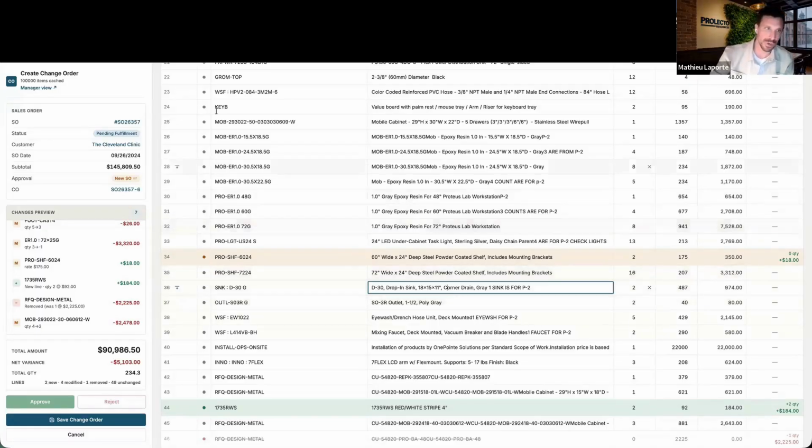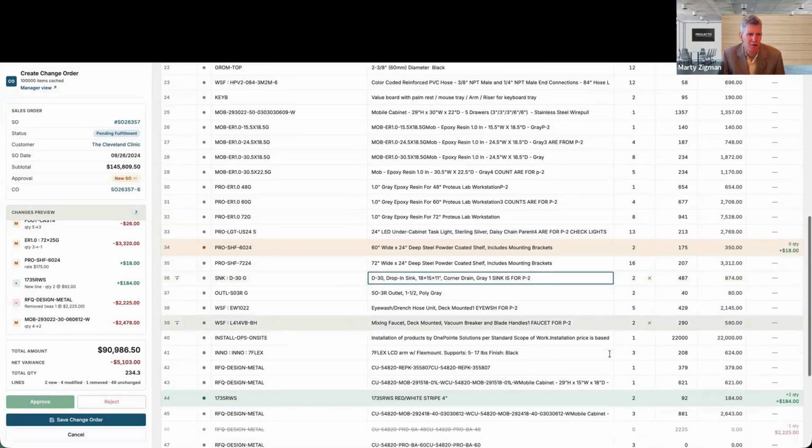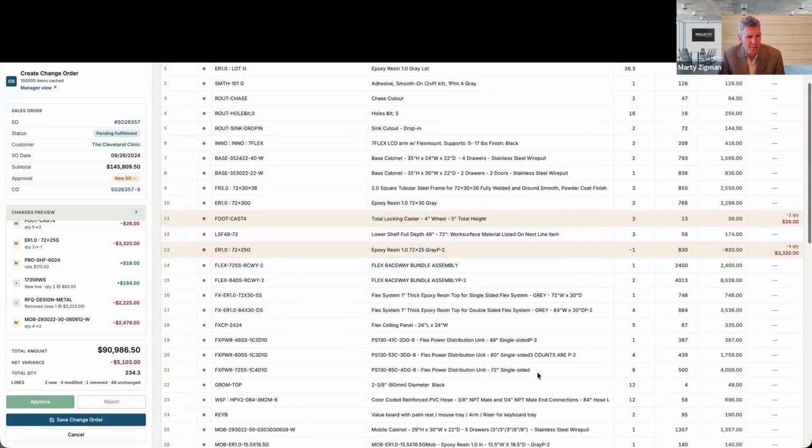So if it was partially fulfilled and I'm trying to drop a row that has been shipped, I will get alerted that I'm not able to do it. This client doesn't want to have it. But yes, you could have another option to show shipped quantity or available remaining quantity. Because of course I just recall from the previous logic that you had, where are we and really that we have shipped partially, so you can't necessarily remove it, because that logic can be all expressed in here. Correct. Okay, yes, great. Okay, so let's continue. I think the basics are here.